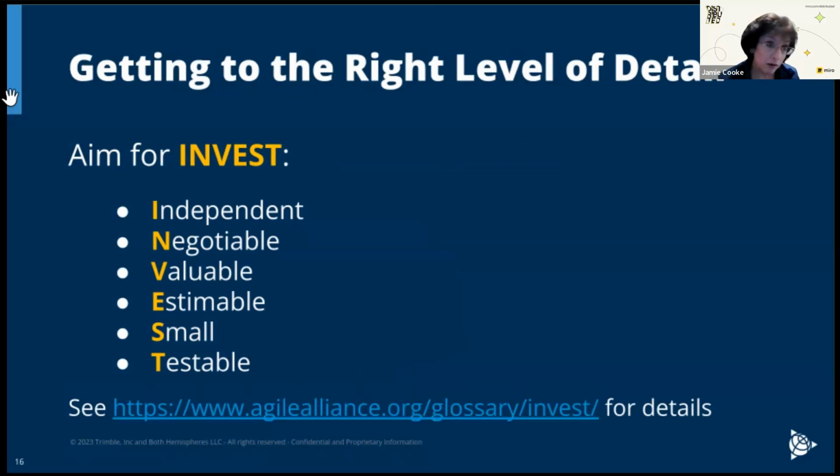Independent is critical. You cannot be having dependencies drive the order of priority, because you'll end up having one high priority item drag in 6 less priority items because they're set up to be dependent. Do your best to do that, and whether it's a services architecture, whether it's APIs, do your best to make sure that the functions do not rely on a bunch of other functions being delivered at the same time to the largest extent that you can.